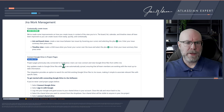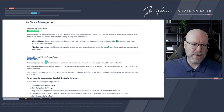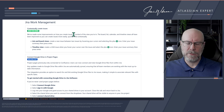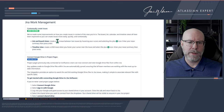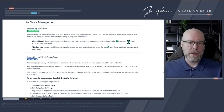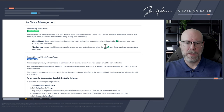Jira Work Management: Contextually create issues. They've improved how you create issues in context of the view you're in — board, list, calendar, and timeline views have all been improved. In list and board views, you can create a new issue between two existing ones by hovering your cursor — a small plus icon will appear. Enter your issue and press Enter. In timeline view, you can create a child issue by hovering over the issue and selecting the plus icon. This brings issue creation closer to where we actually work.